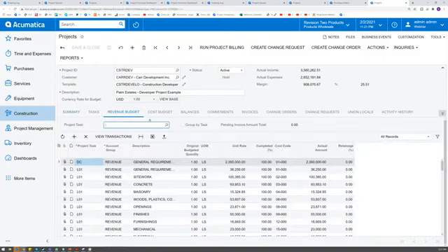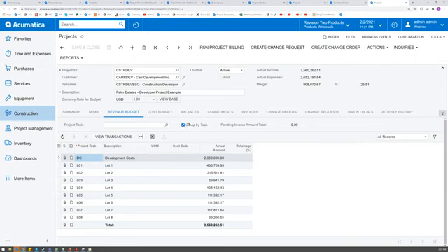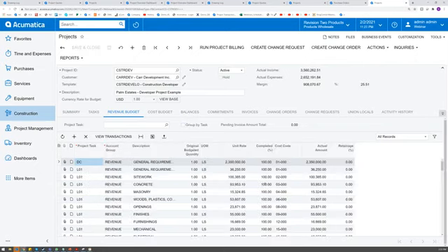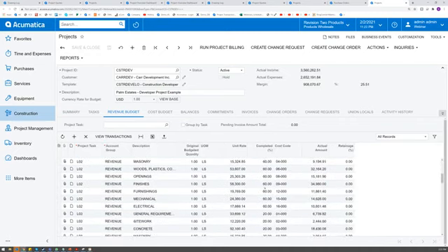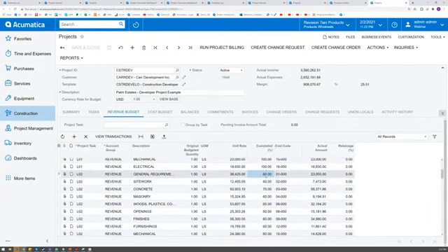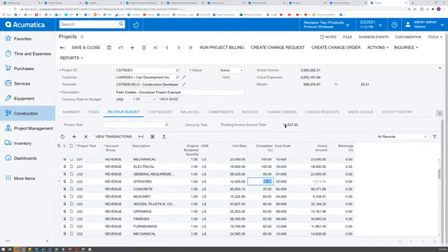you would want to wonder how we can do the billing side, right? So in Acumatica, we support progress billing and time and material billing, right? The progress billing is relatively straightforward. You update the percent complete on a portion of the tasks. For example, this one, I change from 60% to 90%. And then the system calculates what amount needs to be billed, right?